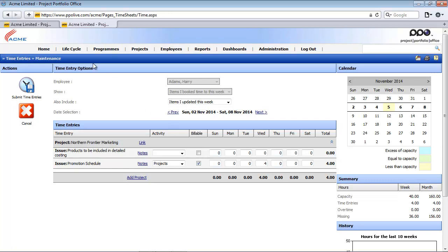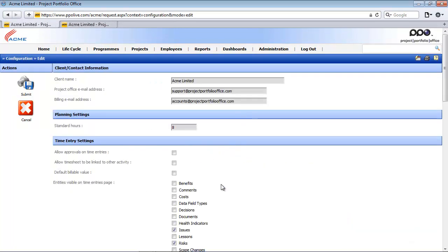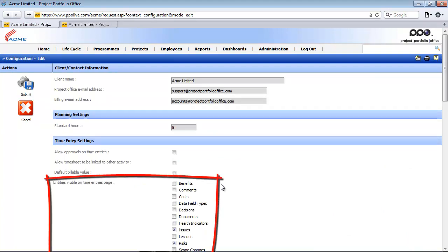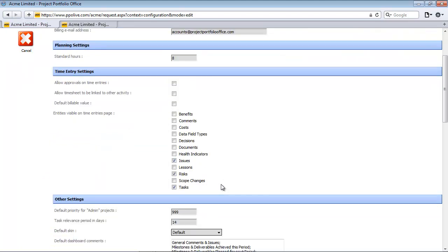Now return back to the system configuration. The last setting here enables you to add more entities on your time entries maintenance page. So by default you can book time against issues, risks and tasks on the project. But maybe you want to also add time against scope changes or documents.